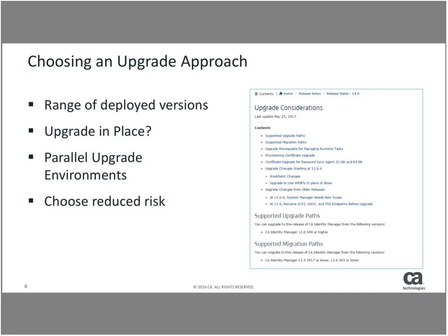So the option of choosing what approach you want depends on what capabilities you have to provide runtime or uptime functionality for your users while you're doing the upgrade. If you have the leisure of being able to take your system down for a couple of days to complete all the upgrades and do the functional testing, regression and acceptance testing from the users, you'd be able to do that with an upgrade in place strategy, assuming that you're coming from a version that you actually can upgrade in place. You have to be fairly close to the 14.0 release, let's say 12.6 and higher, to be able to do that upgrade in place and minimize the risk of having any problems with the integrated components.